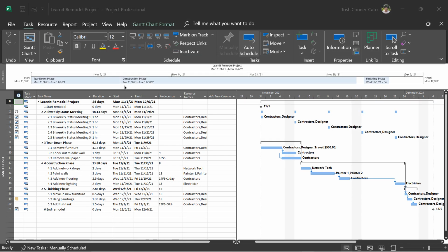Even though this project plan was scheduled to start on November 1st of this year, we're going to go ahead and get started early. We're not going to change our original plan file. We're not going to update the start and finish dates. We already saved them in our baseline at the end of the beginner class. So we're going to get started tracking actuals.